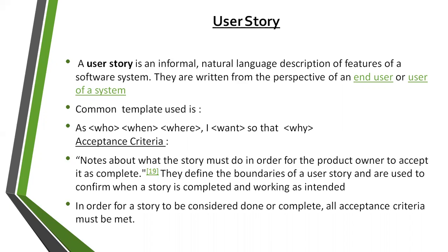In priority order, what work is to be done we discuss during the sprint planning meeting. Then the work starts, and that is the daily scrum meeting. As soon as the work is over for the past 10 days, we call it a sprint review. Then after delivering what needed to be done in those 2 weeks, we have a sprint retrospective.